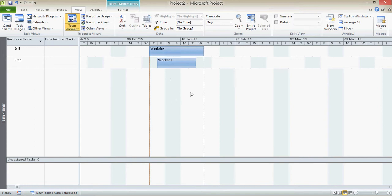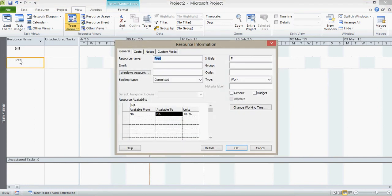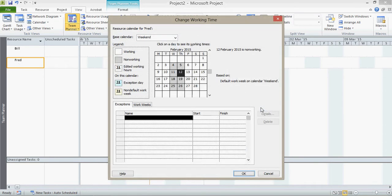Okay, what we can do is we can make an exception to Fred's working week and say we do want Fred to work on that day to bring this forward. So what I can do is just double click on Fred here as a resource. And if I now go to change working time, this is no longer the base calendar. This is actually Fred's calendar, which is based upon the weekend calendar.